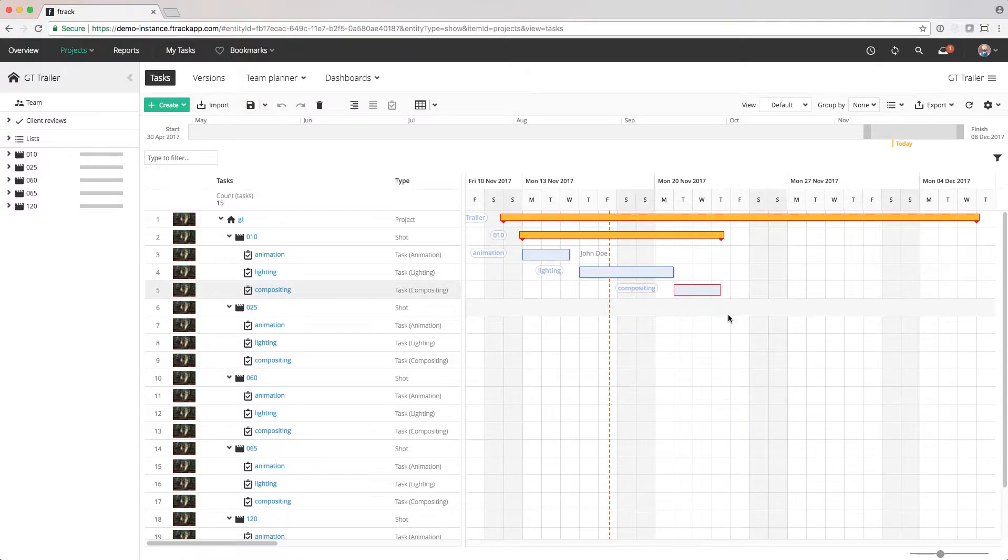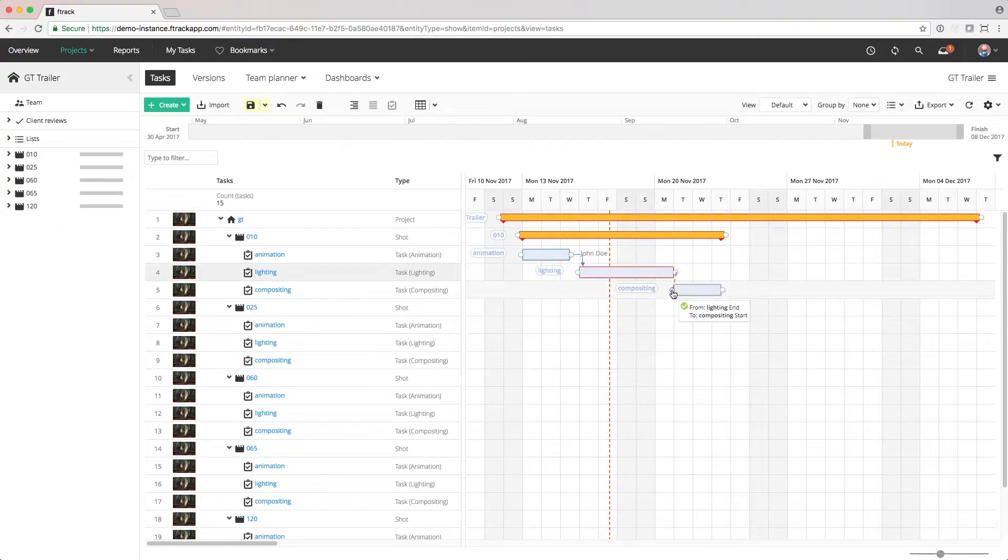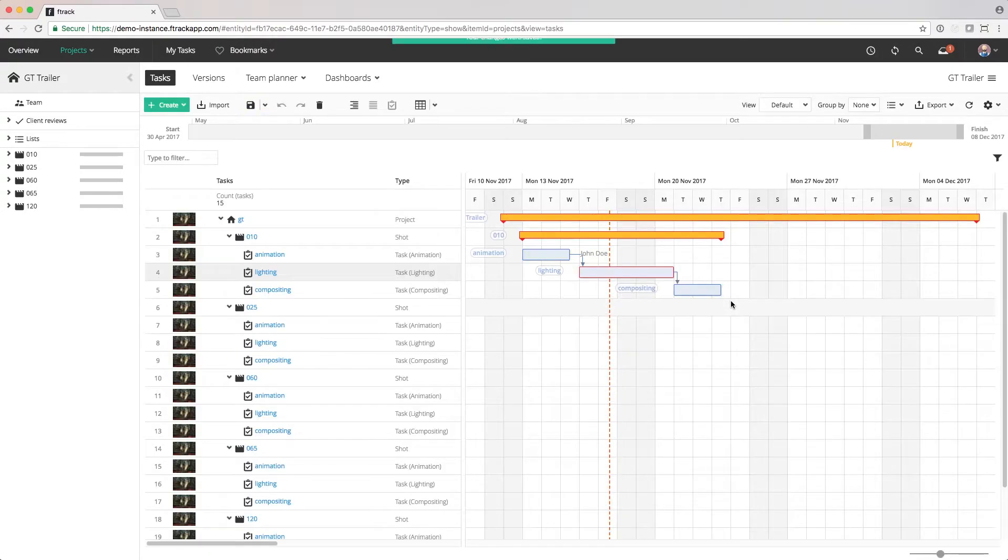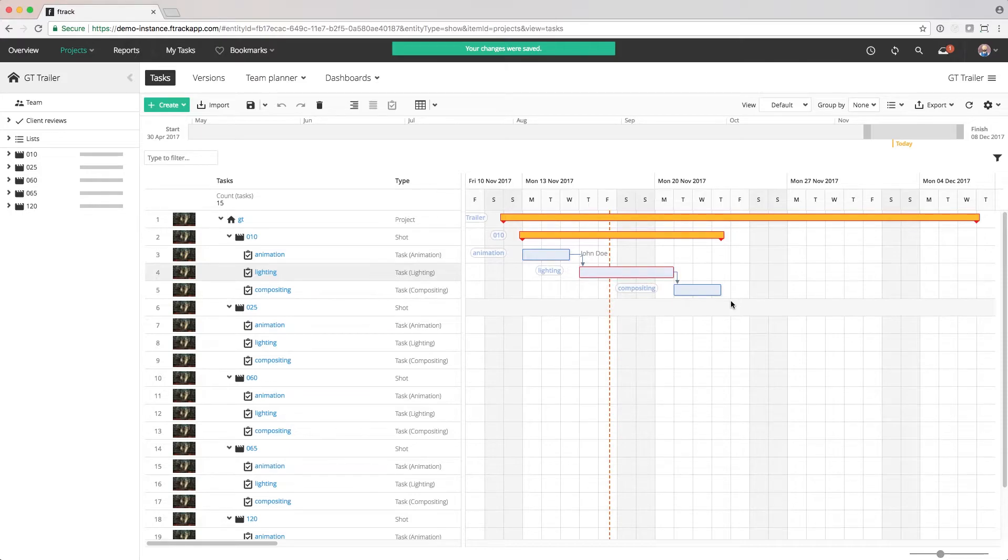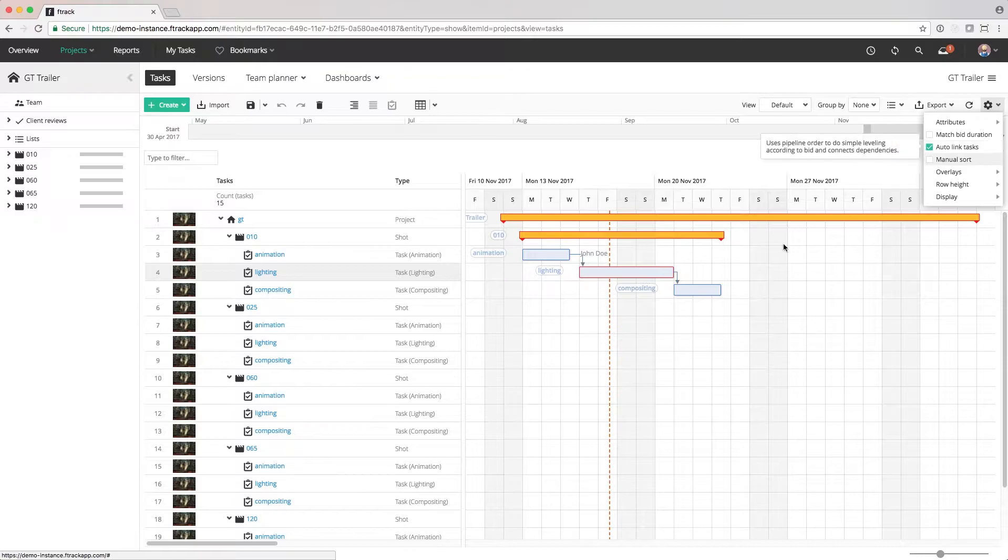We can also create links between tasks or between other objects to indicate that there's a dependency or they are related to each other. And for convenience, we can set the dates and link the tasks in one step by enabling the auto-link tasks setting.